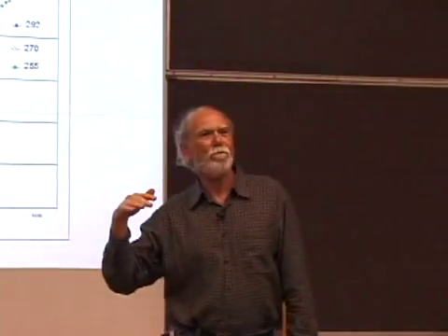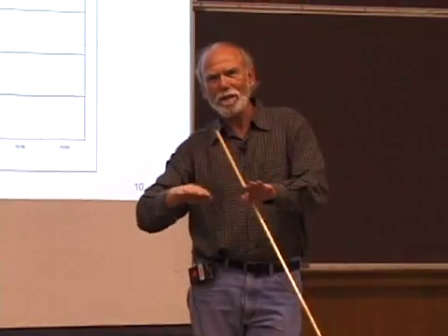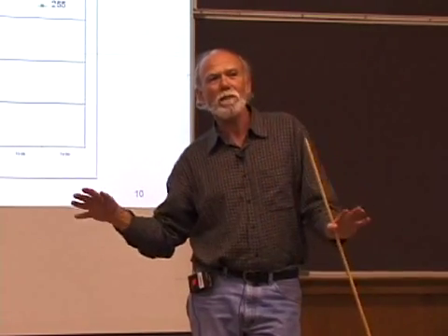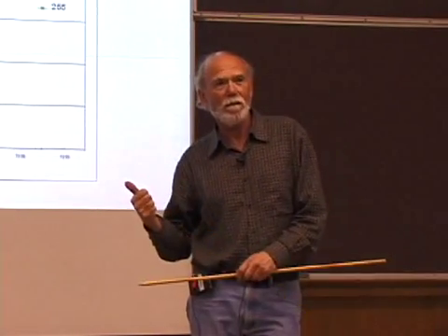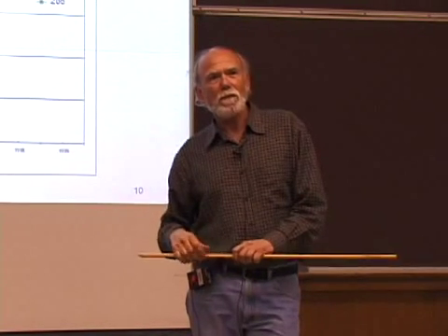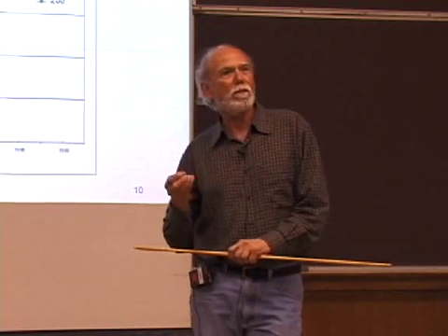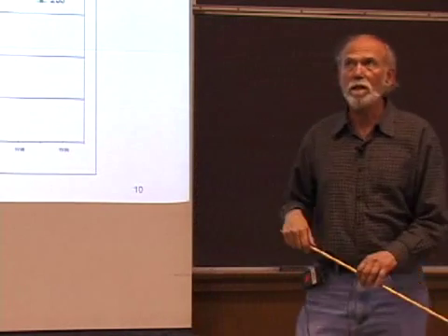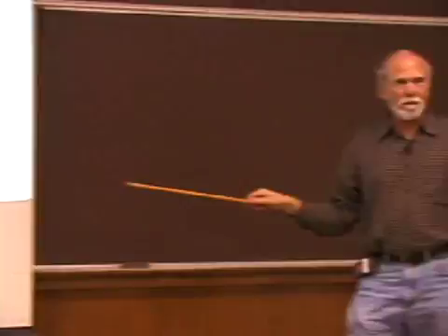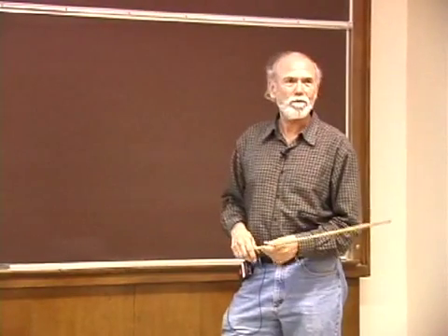So 240 some million dollars was going absolutely to identifying everything, and where you mess up there is the things you forget, or things that you misidentify or misdesign, things that you have to redo completely. But otherwise, that should be pretty good. If you've designed it and you know all the pieces, you should be able to get those pretty much right.